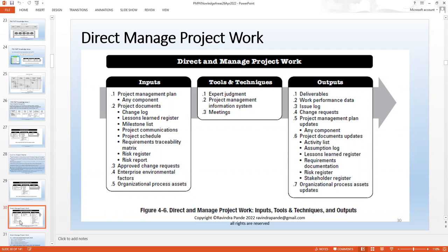So time and material reduces the risk of a project manager, but whenever you come to a fixed budget, like 1 million to create the complete enhanced attendance management system project, which includes all those things, here even the risk or approved change request matter the most, because for each and every approved change request, we might charge the client separately. We might not charge the client separately, depending upon the contract, depending upon the agreements we have done earlier, and we can refer to the project charter or the BRDs and BSDs or the SRS of the world.